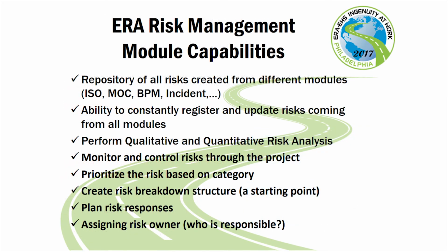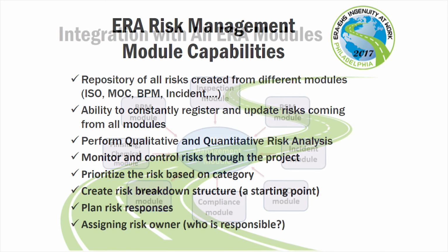To summarize what the module can do: it's a repository for all risks created from different modules. So we have ISO, management of change, business process management, and incident, which is safety. It has the ability to constantly register and update risks coming from all the modules, perform qualitative and quantitative risk analysis, monitor and control risk through the project, and prioritize the risks based on category. Create a breakdown structure, a starting point, plan risk responses, and very crucial, this very last bullet here, assign a risk owner. Who is responsible, right? Somebody actually has to be doing the work that's out there.